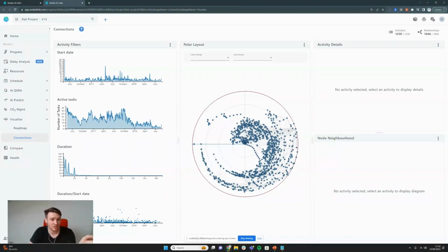But here we can see that actually the active task limit is generally consistent across time and creates a nice S-curve throughout it. Obviously, commissioning and handover at the end has a lower element of activity, but in general, the bulk of the program is consistent.